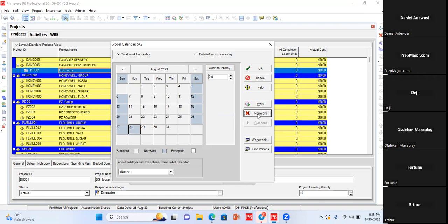Right. So now go to December. December is the next holiday. Most companies don't work between Christmas and New Year. So you can click on 25th, then hold down Control on your keyboard. Please wait for me. Hold down Ctrl, then click 26. Just hold it down. Click 26.